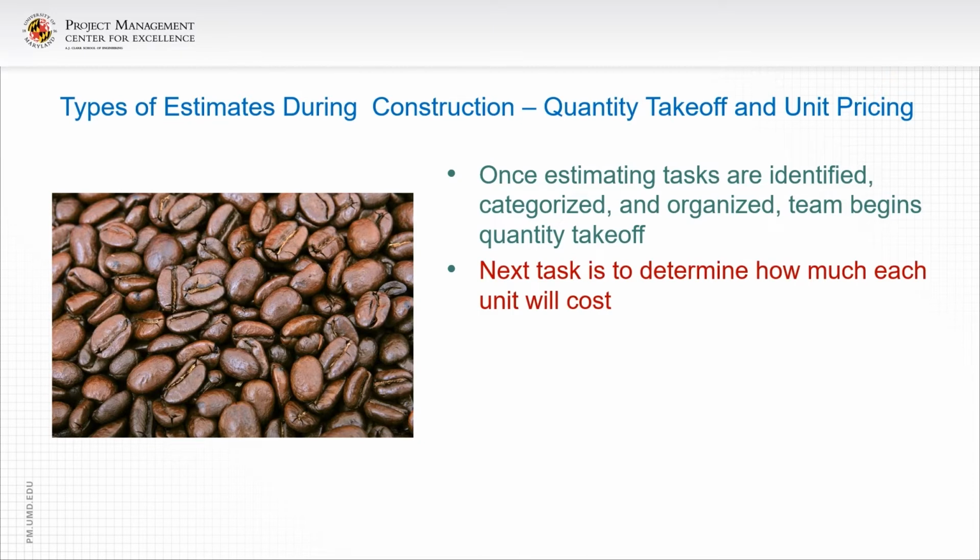The next task is to determine how much each unit will cost to produce, deliver to the site, accept and store at the site, and install in the correct position and maintain until the project is turned over to the owner.